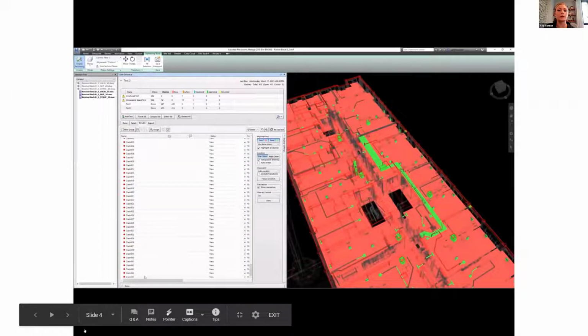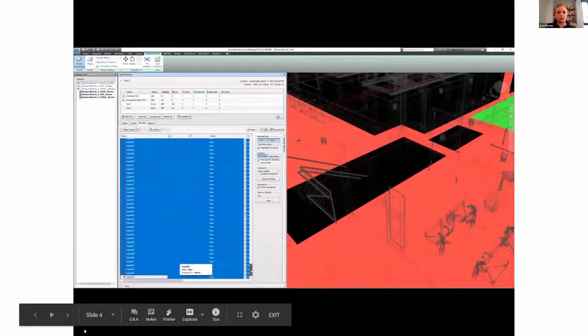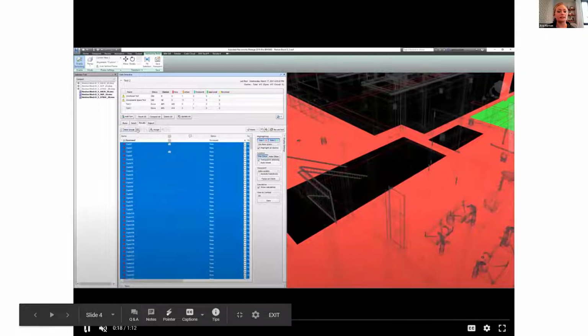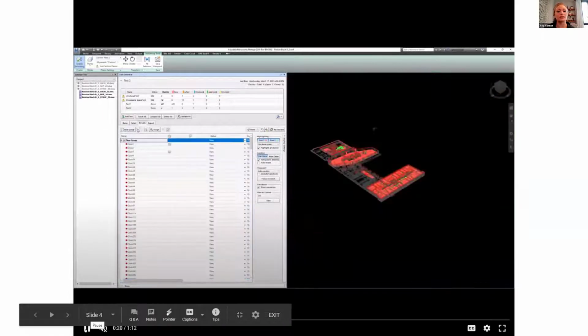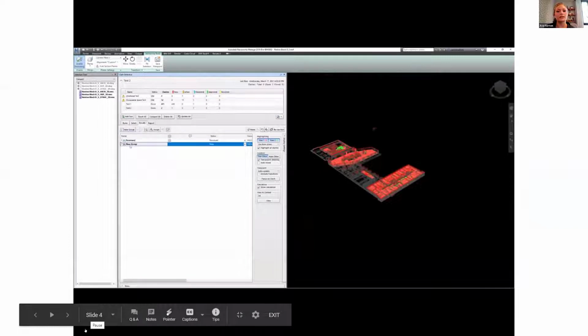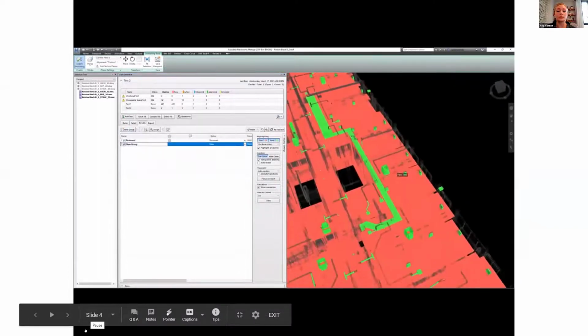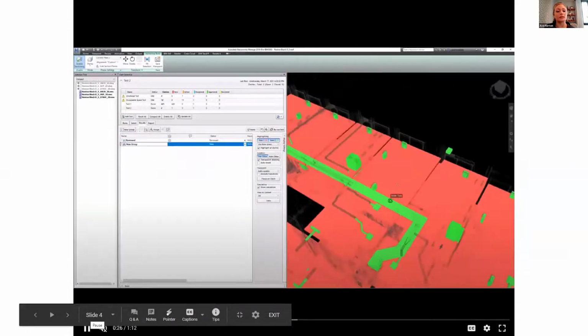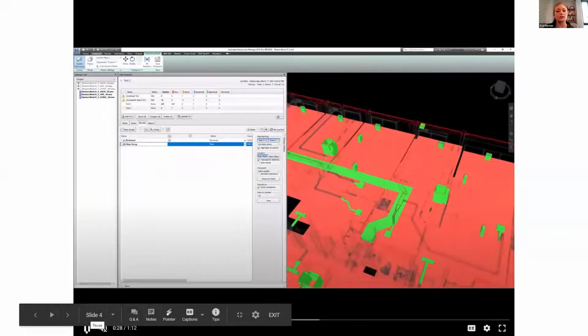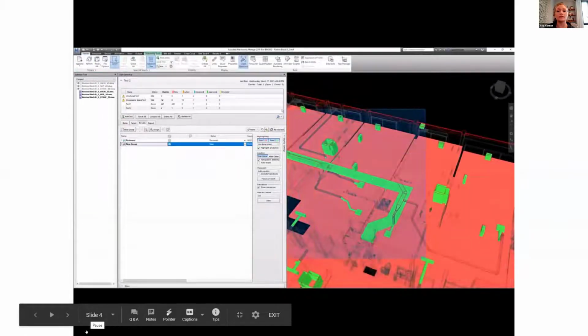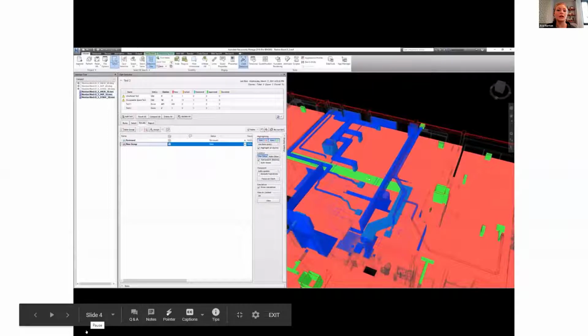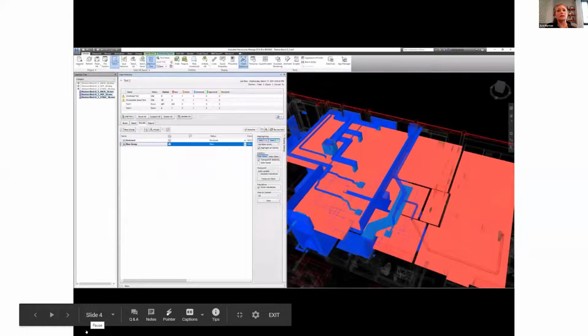And the way that we do this is really to just pull it all together by one zone and create a group. And then we work backwards by deducting similar issue types together. And the way that we do this in design is really looking at program type, not necessarily system type like we would in construction. So in this particular case, with this model, we're looking at a unit because we really want to understand all of the major clashes just within the unit. In a large, let's say, hotel, we may be looking at a larger room.